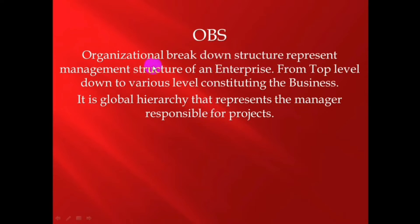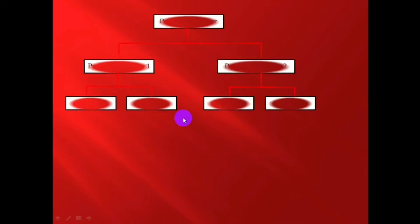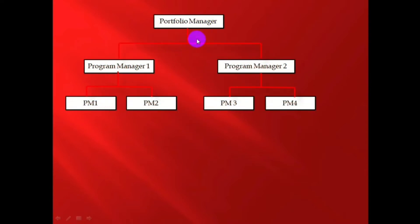OBS goes from the top level down to various levels constituting the business. It is a global hierarchy that represents the managers responsible for projects and shows the resource structure of an organization. Both EPS and OBS are linked with each other. In the OBS example, a Portfolio Manager — similar to the top level in EPS — is responsible for all the projects in Asia Builder.